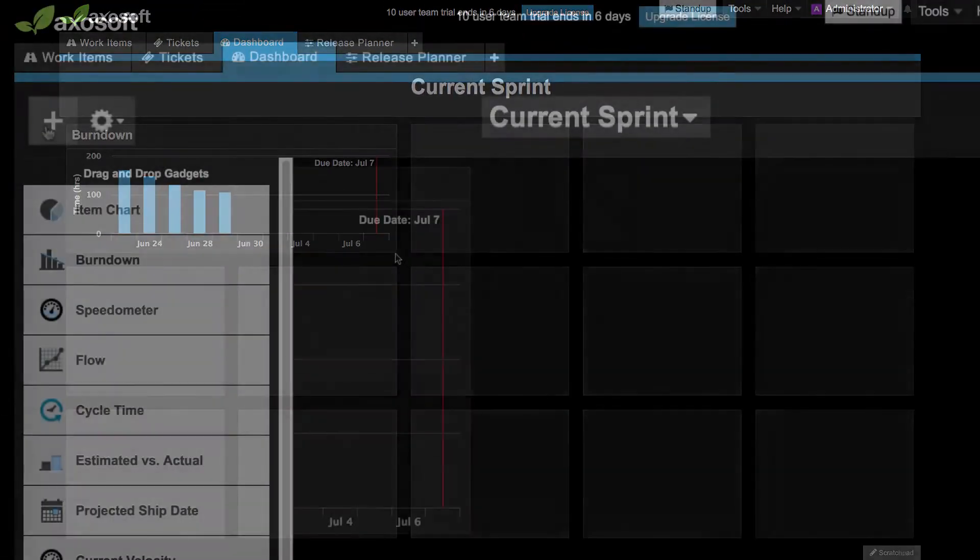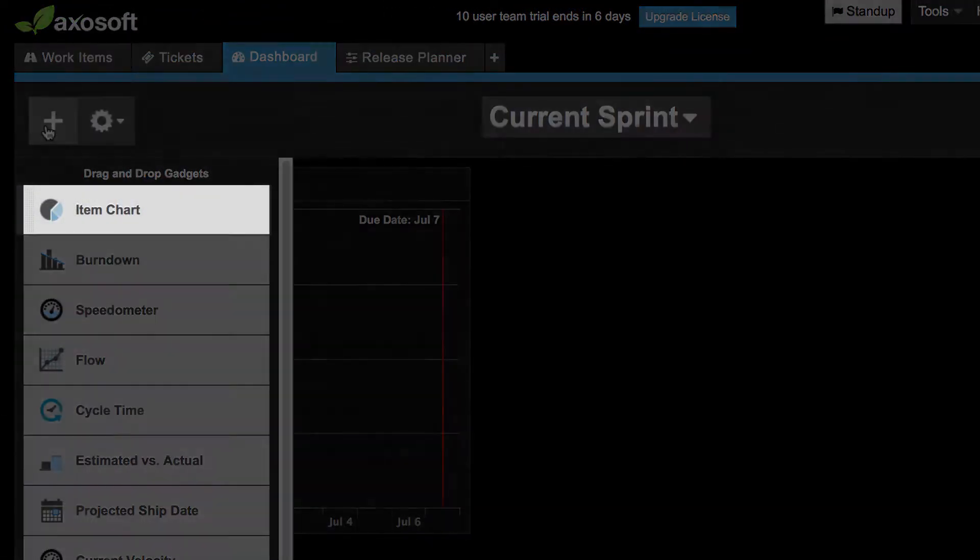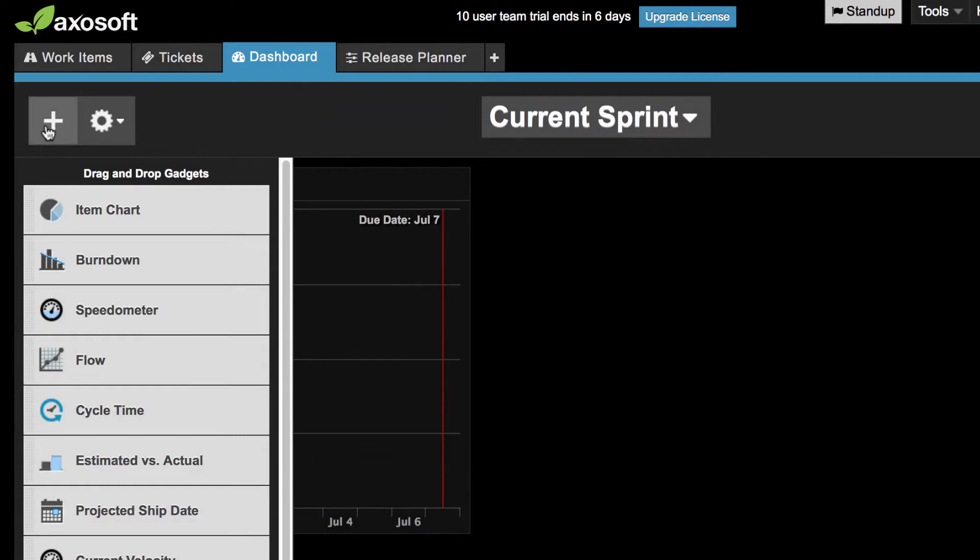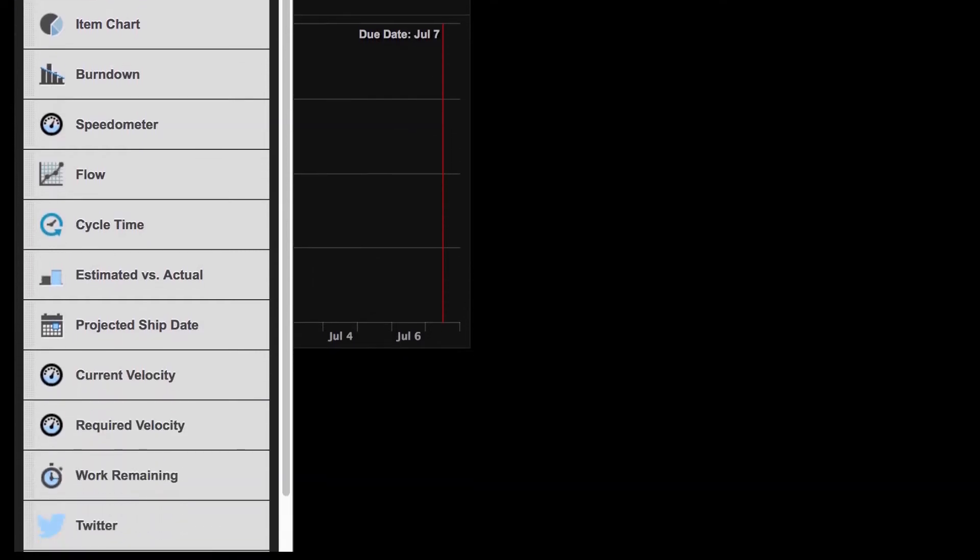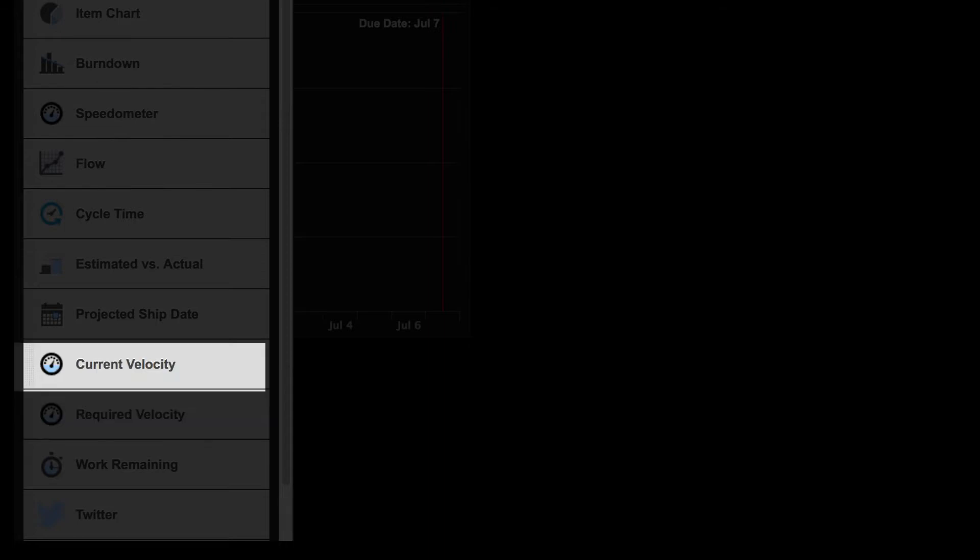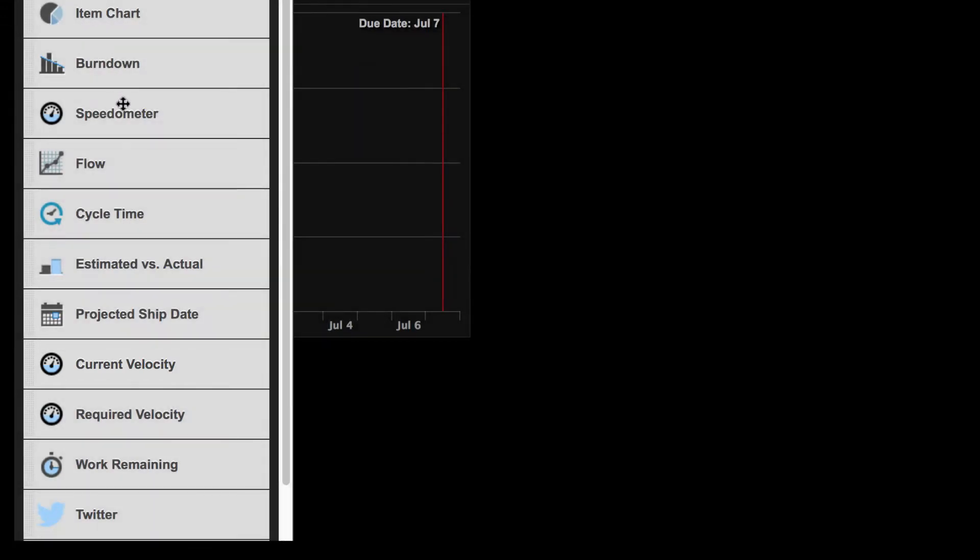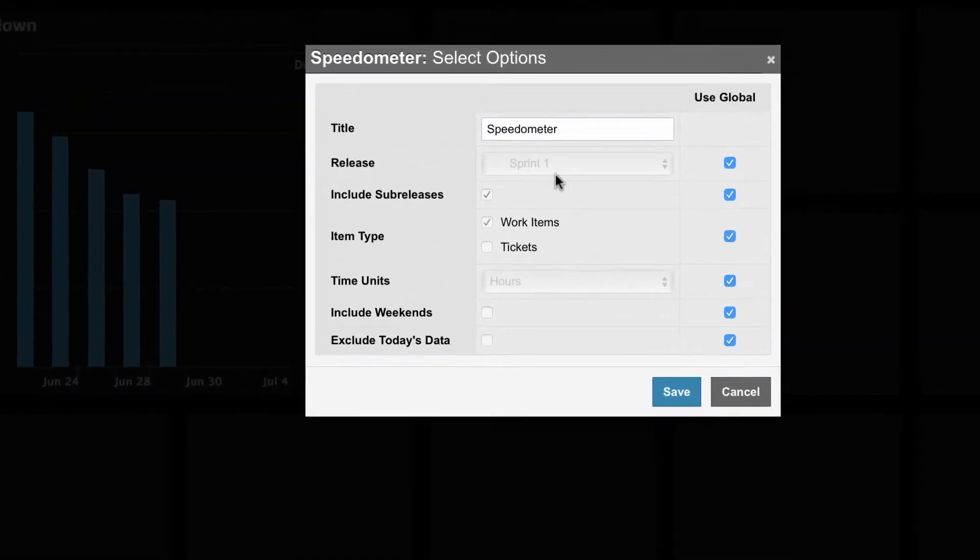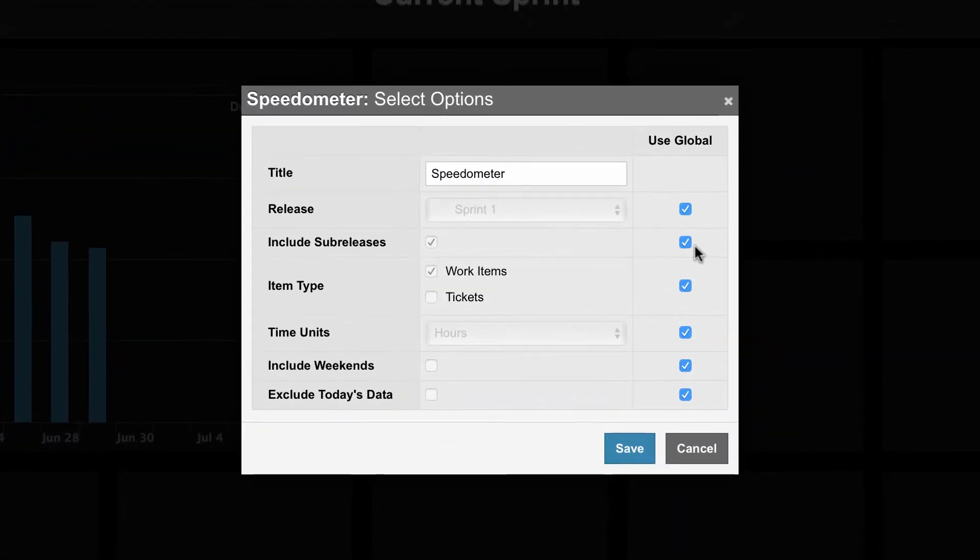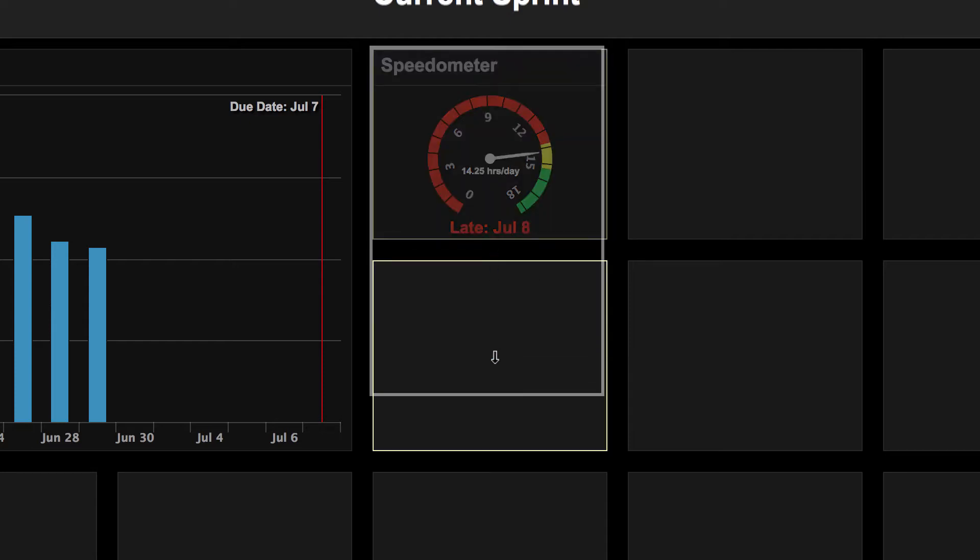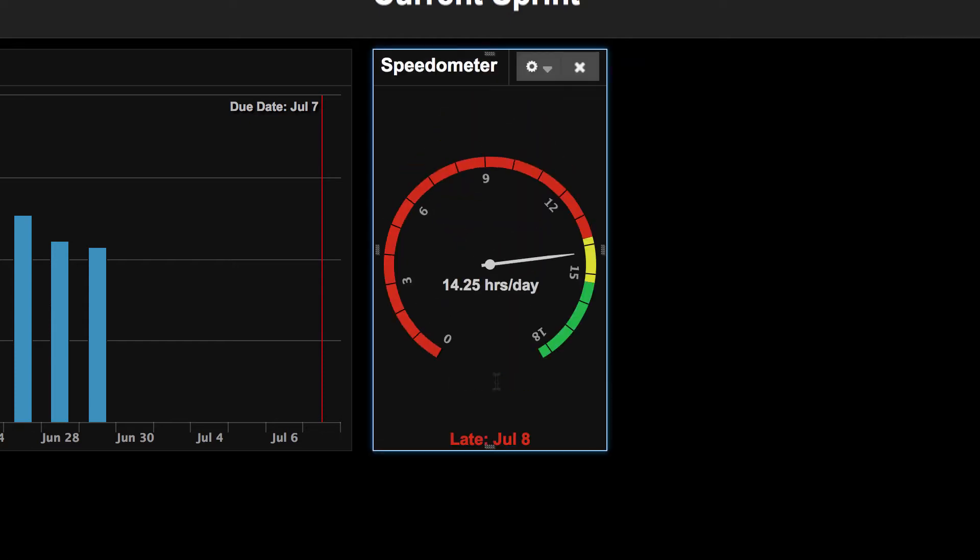Other dashboard gadgets include the item chart which we'll talk about more in a moment, the required velocity which tells you how fast the team needs to work in order to meet the due date, the current velocity which shows you the current velocity of the selected release or sprint, the speedometer which is a visual way to see your projected ship date, required velocity, and current velocity all at once. The green section here would represent my required velocity.